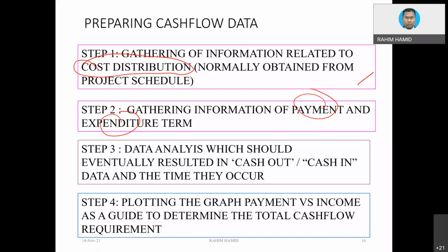Sometimes the SOP is fine, but the issue is with the human, the staff that is basically manning the evaluation of the cash flow, and then you need to get the signature of that person. If that person is not around, going for holiday, then you have to wait. And sometimes those are the things that we call late payment. Late payment is a big thing, not only in Malaysia, it's a worldwide issue. Okay. All right, so that would be an example.